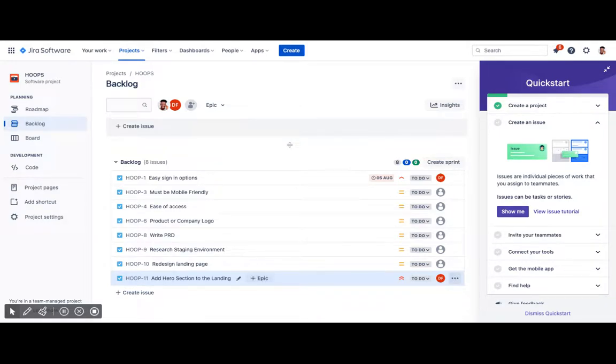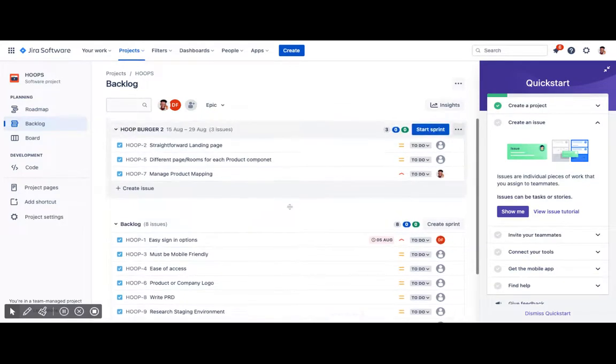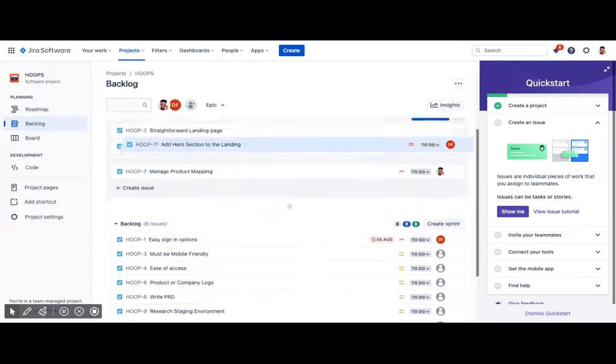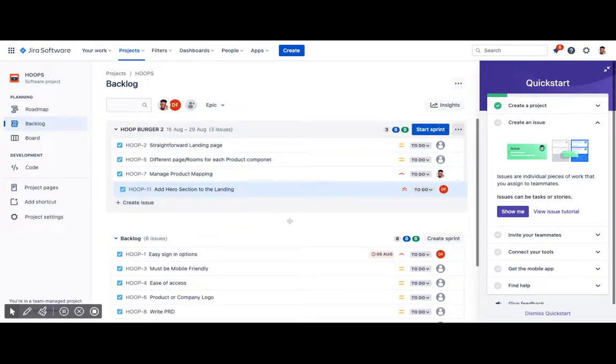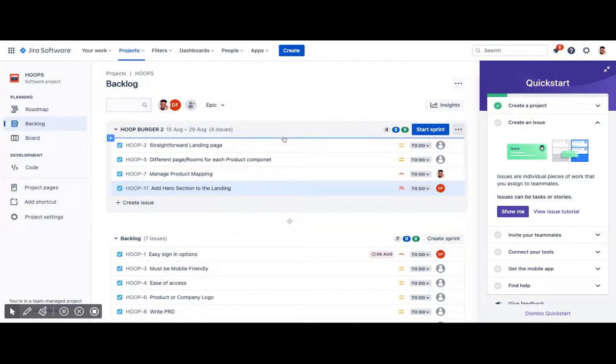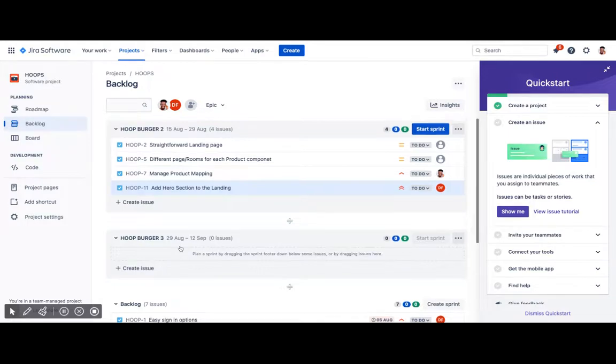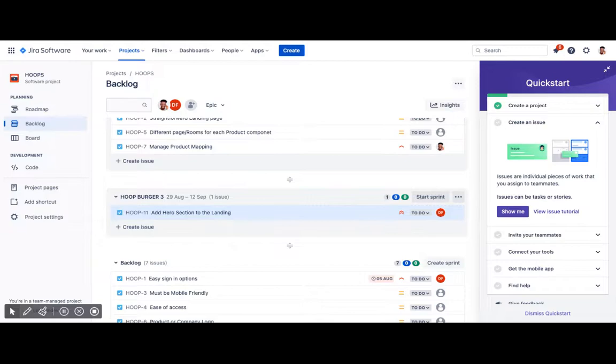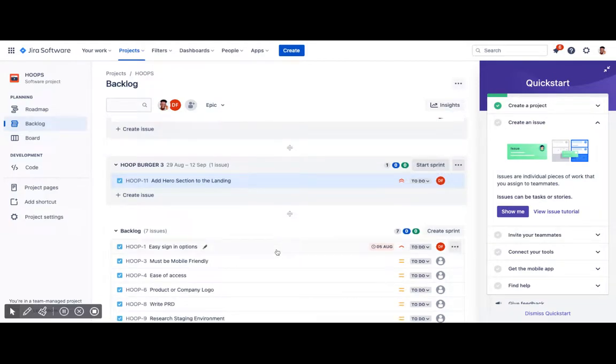It just would require multiple persons, maybe the lead engineer, the product leads, and oftentimes the scrum master managing the grooming process, determining what needs to be created. And when that is done, we start fishing out based on priorities what should make its way into the sprint, right? You see, this is an old board, anyways, but I'm using it as an example. If you don't have this existing, you just click create sprint and you have an empty board. So you could drag your tickets. This is a drag and drop feature. You could just drag your ticket into that space where you need it to be done.